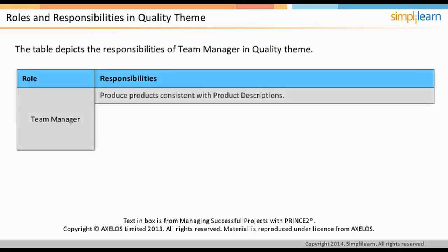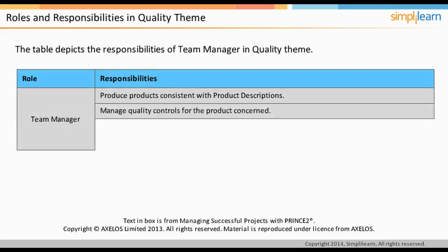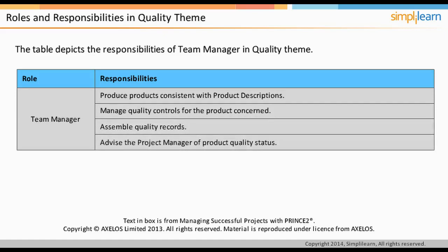Team manager produces products consistent with product descriptions, manages quality controls for the product concerned, assembles quality records, and advises the project manager of product quality status.